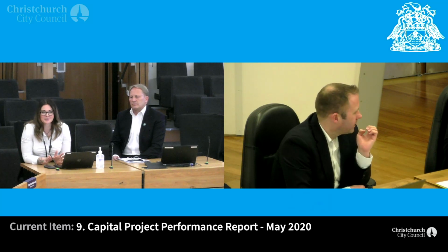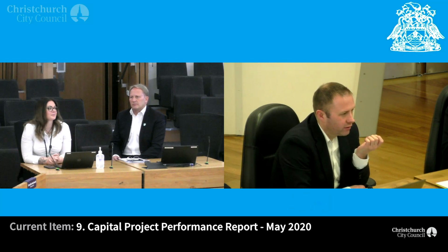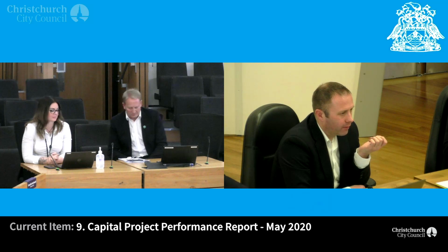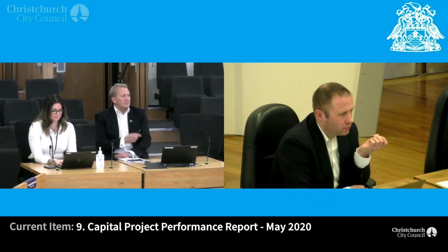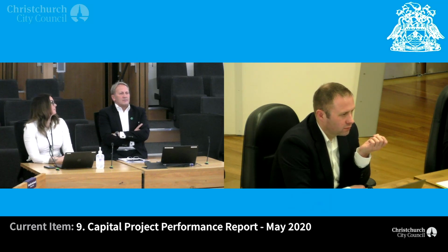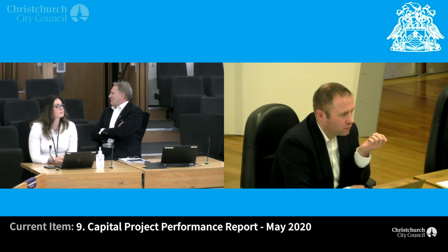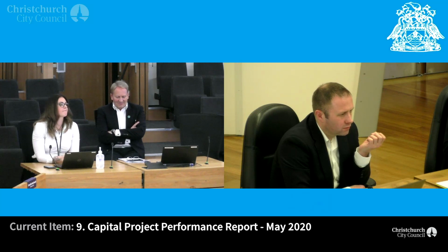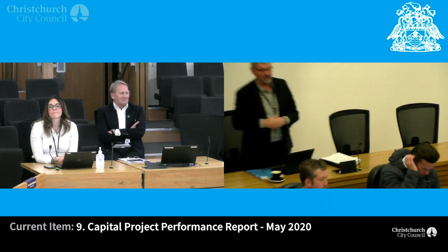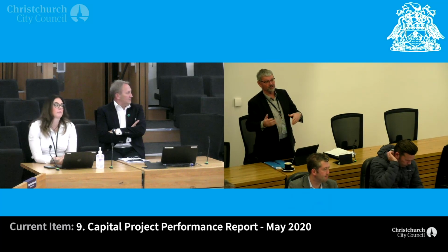I'm not the right person to respond to that. So David probably is. What's changed is the rules around disposal of coal tar because of, help me here, someone, I can't remember the chemical name of whatever leaches out of it. So we used to be able to dispose of it into clean fill, now we've got to dispose of it into a secure landfill, so there's an additional cost.